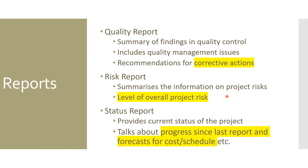The next report is a risk report, which summarizes information on project risk. It summarizes the risks available, the level of overall project risk — whether it's green, yellow, or red — and can include an overall risk score. It gives a summary of total risks identified in the project, the impact, and the overall risk score.